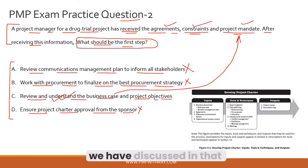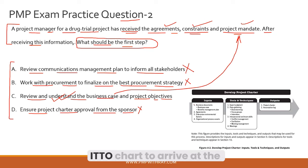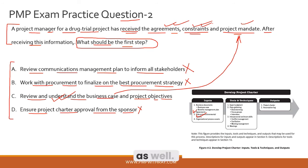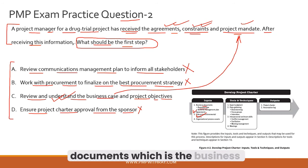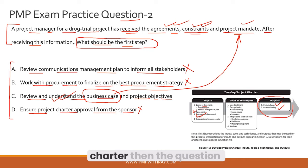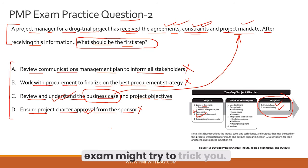Looking at the ITTO chart from the process group practice guide: you need not memorize it by rote but understand its applicability. The inputs include agreements, enterprise environmental factors linked to constraints, and business documents such as the business case — which is the phrase in the correct answer option. The outputs are the project charter and the assumption log. Once you have the project charter, then comes the approval from the sponsor.